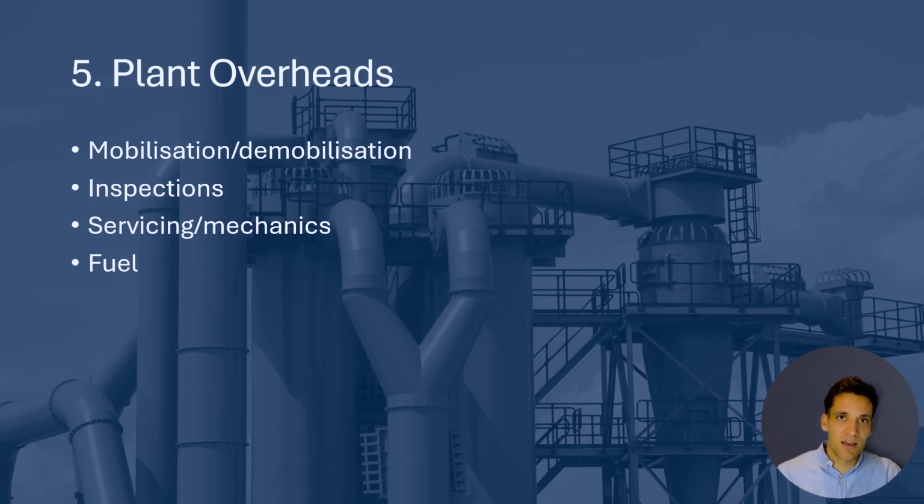So having to up-spec plant, having to fit certain things to it so it can meet the safety requirements working on site. You might have to factor in any servicing or repair works that aren't covered in your original hourly rate. So we already spoke about building servicing costs into the annualized rate for the plant, but you might also have to factor in additional servicing costs or any repairs for damage on site, and also fuel. So fuel depends whether you built it into your rate previously or not, but some projects prefer to just have a bulk fuel purchase and have a fuel tank on site. You just have to make sure all these items are covered so you're not missing anything.